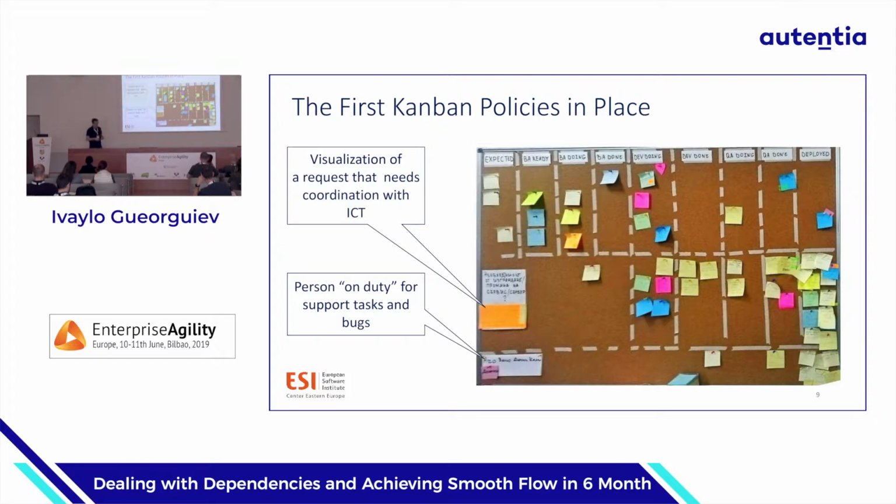And they know this feature will require synchronization with the ICT department. When they put it here, they ask the ICT department and they discuss with it what is the feature, what they need, and so on. In many cases, the ICT department says, okay, you think it's like this, but you need this, this, and this. So in a very early phase, they elaborate the requirements. They elicit the requirements about the deployment together with the ICT. And they collaborate in an early phase.